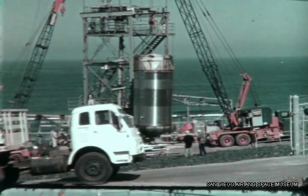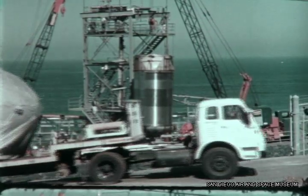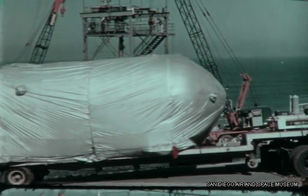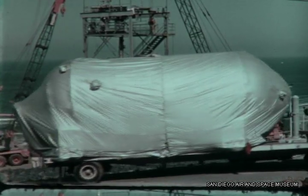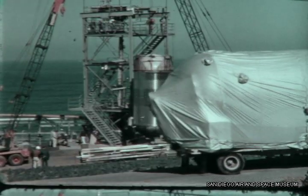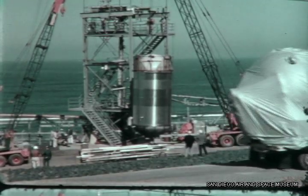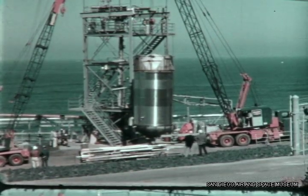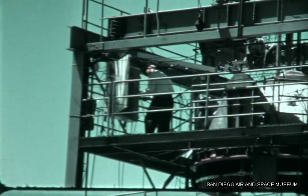On May 5th, the first cruiser tank was removed from Point Loma. It was returned to the plant for rework and for the installation of engines. It is now scheduled to be used in the static engine test program, which begins in October of this year at our Sycamore Canyon engine test area. The second cruiser tank was installed the following day, and in June, a Centaur propellant utilization system was added for